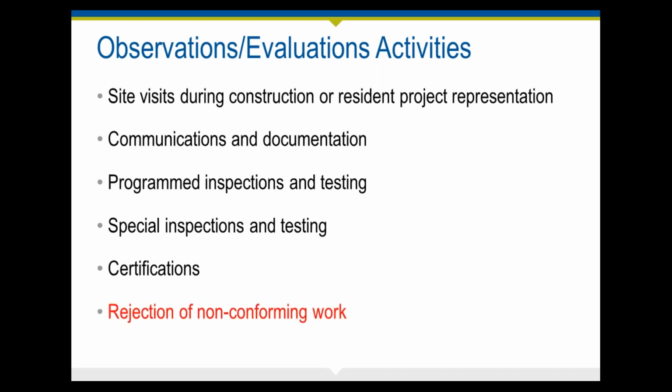And then finally, you need to understand that based on these types of services, you may have the authority to reject non-conforming work. And this is typically a huge responsibility. Not all firms have it in their contract. Owners may not want you to have that kind of authority, but if you do, you may be called on to reject work that does not conform to the drawings, to the contract documents as you see it.